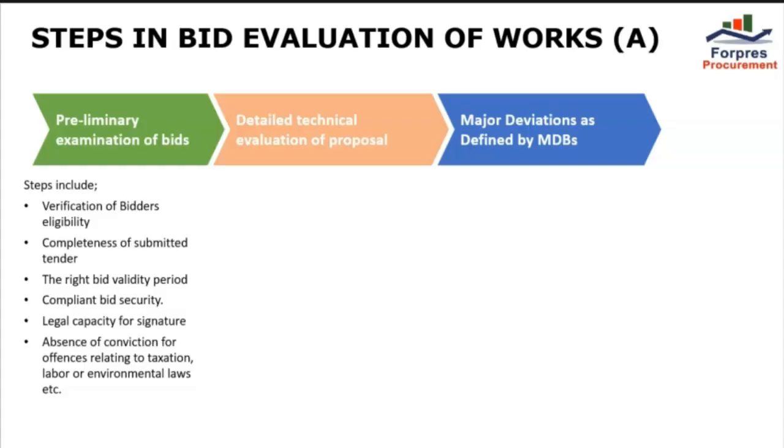This step in the technical evaluation includes reviewing number 1, the site organization organogram proposed by the bidder and whether it shows that the bidder is allocating sufficient personnel and material resources for execution of the works as well as adequate site facilities for the temporary works.